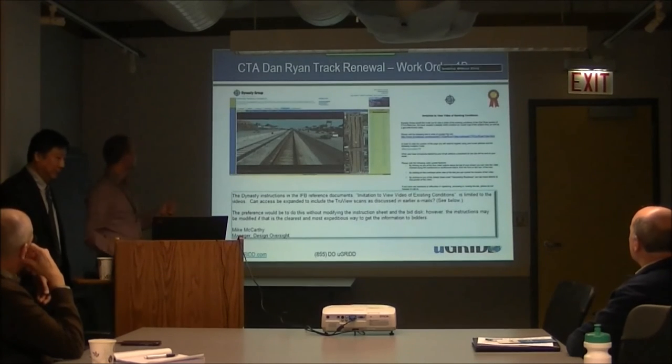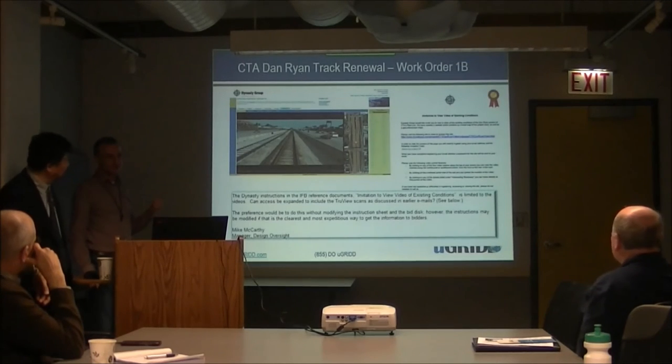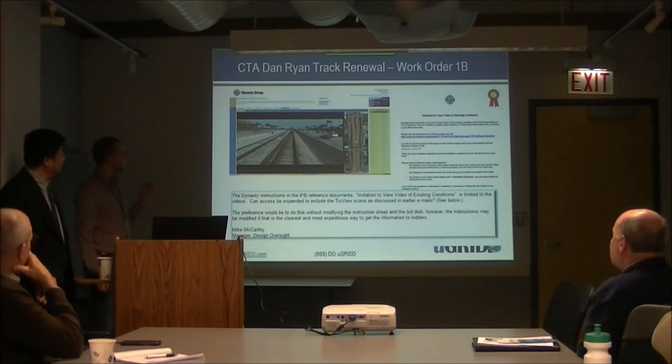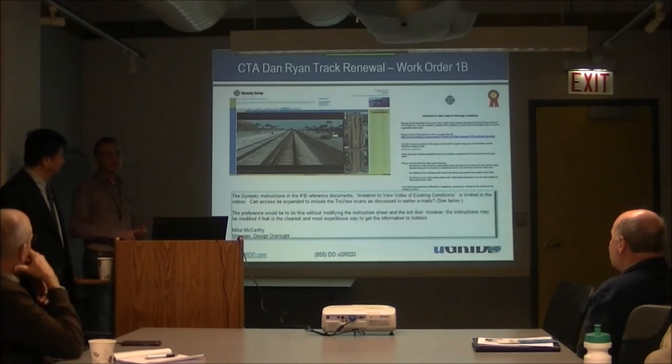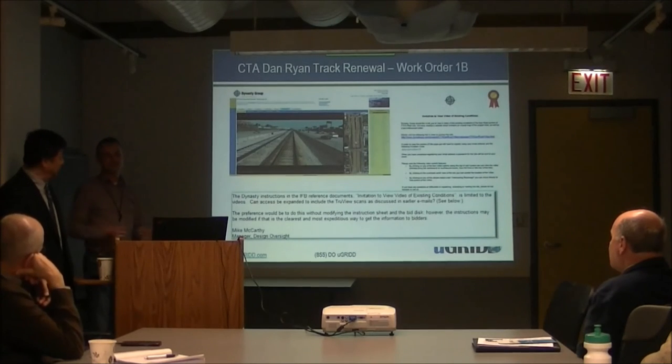So this is the first project that we used uGRIDD on, with the terrestrial LiDAR, and we were looking at the tunnel before. But on this project, we were able to share the LiDAR data and the other design data through uGRIDD with the contractors doing the bidding. So they got a much better view of the project without having to go visit the project site, which can allow them to submit better bids, and we don't have as much uncertainty.